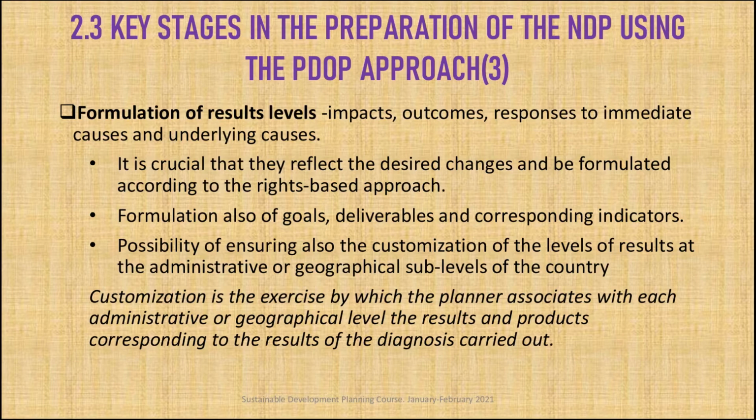And at this step, there may be the possibility of ensuring also the customization of the levels of results at the administrative or geographical sub-levels of the country. Customization is the exercise by which the planner associates with each administrative or geographical level the results and products corresponding to the result of the diagnosis carried out at central level.